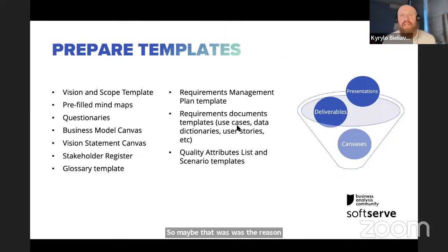So I would just say go back to understanding the business need, the goal and the vision of the product. You may have, for example, a product vision workshop where you identify what we are trying to create, for what reason, and what we are trying to solve. So align on that part first, because in most cases, from my experience, when the requirements change a lot, it happens when stakeholders don't have a common vision and a common understanding of the business need.